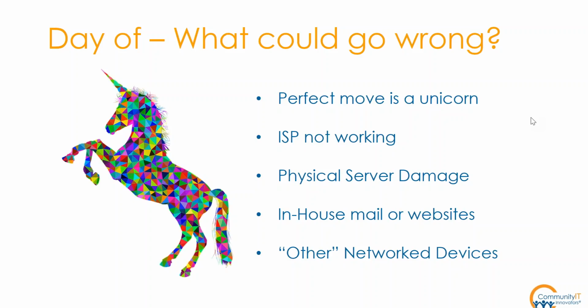So the other thing, again, we've done a lot of moves, and I've never had a server get damaged in transit, but that's not to say it couldn't happen. So you really want to make sure your backups are all good the week before, and also that your hardware warranties are all up to date on your servers. As much as possible. Right.